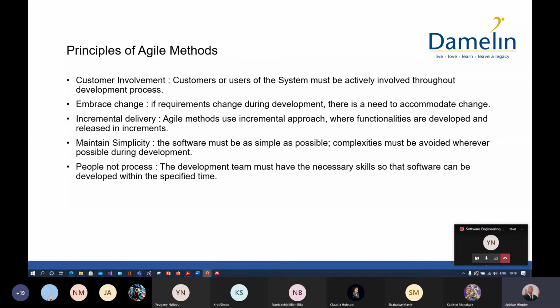In the plan-driven approach, we only speak to the customer during the initial planning phase. Then once we've done that, we generate documentation, and from there the project team just delivers the product. But with the agile philosophy, we need the customer involved.